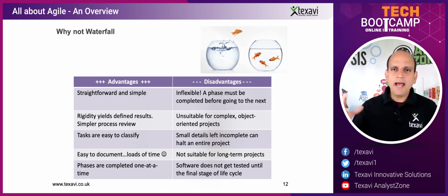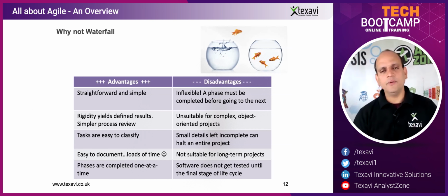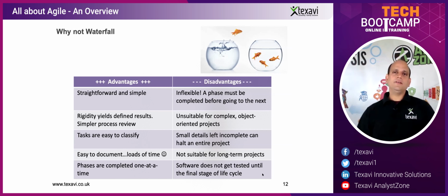You're trying to add more and more fat, but at the same time, what you can't understand is there's no linear relationship between the number of people and the amount of work they do for productivity. So in effect, you're just adding flab onto the project without any clear result in terms of the productivity or the work itself. So that classic case of putting 9 mothers to create a baby in 1 month is leading to a disaster. And that's the reason why it never worked.